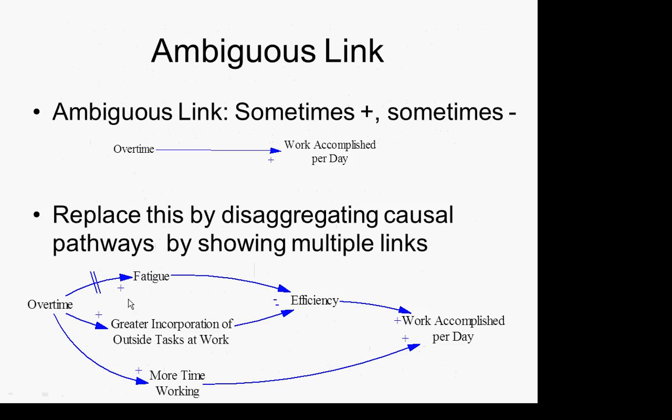Consider how overtime affects work accomplished per day. The truth is it affects it through different pathways with different time costs. On the most obvious lower pathway — the one a lot of managers focus on — overtime leads to more time working, and that leads to more work accomplished per day, all other things equal. So along that lower pathway we have a positive polarity: an increase in overtime, all else equal, means more time working goes up, and more work accomplished per day goes up.